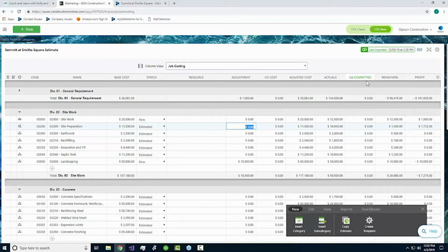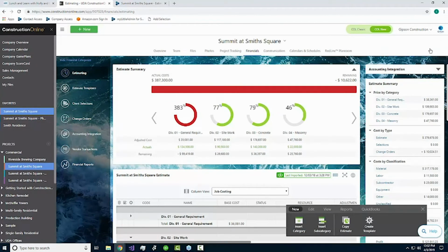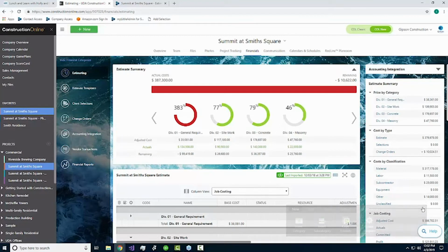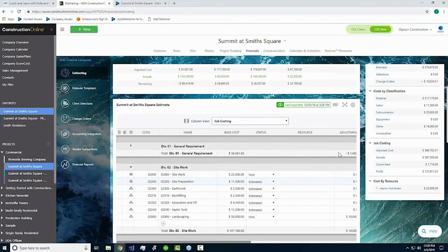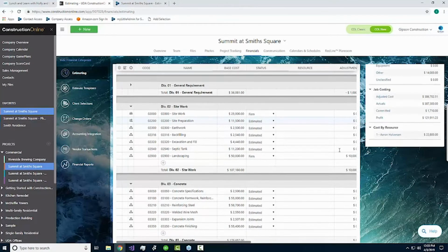Well, and it helps you preserve your base estimate, which is really critical when you are comparing or reviewing how your project's actually finished out. Some clients that I work with do have the leeway, or they make the choice, to edit their original estimates after the fact. My recommendation has typically been to leave it as it stood when you first put it together.